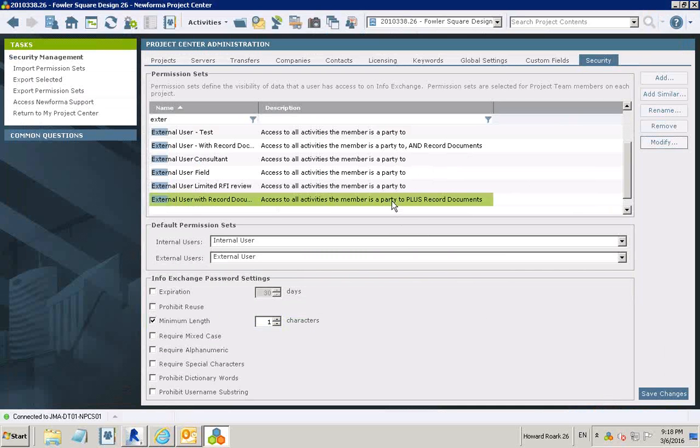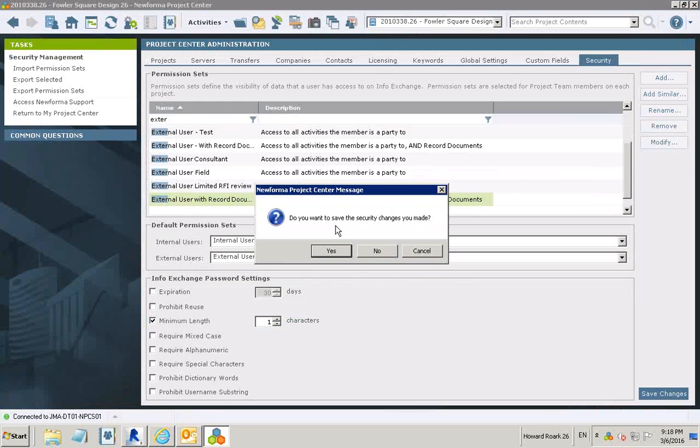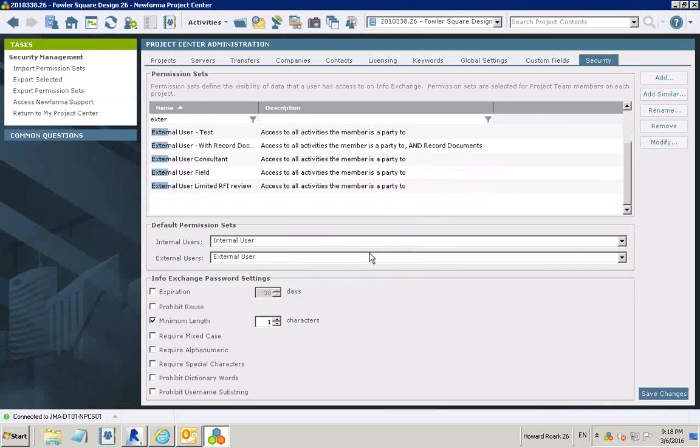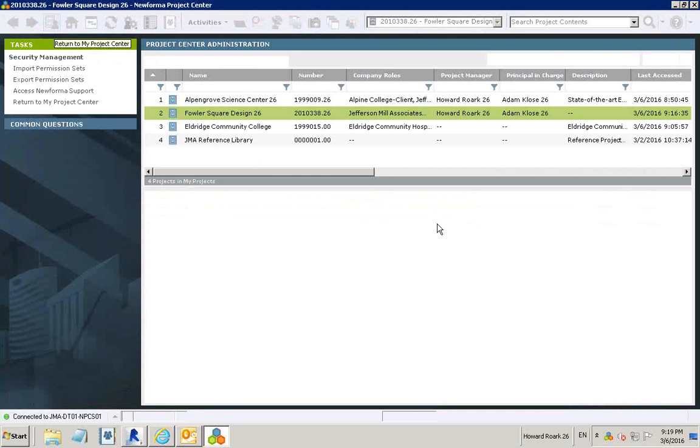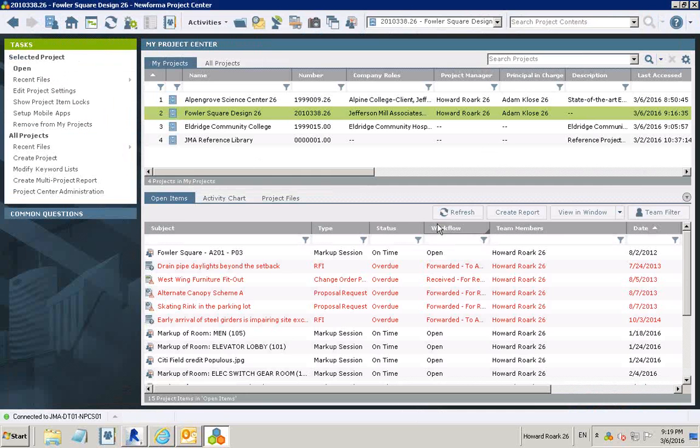No, I think that's straightforward enough. So I think for our larger contract docs, we do record documents, but for quick and easy footings, morgues, they can just get dumped in with just add a folder. It's only where you've got external parties like contractors and other consultants accessing them that you'd want record documents. But if it's only internal, us, it's nothing to do with the other.